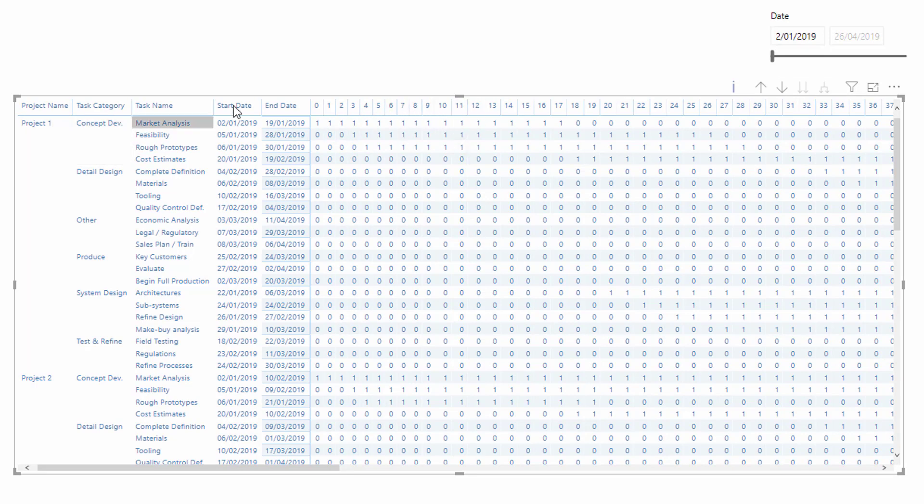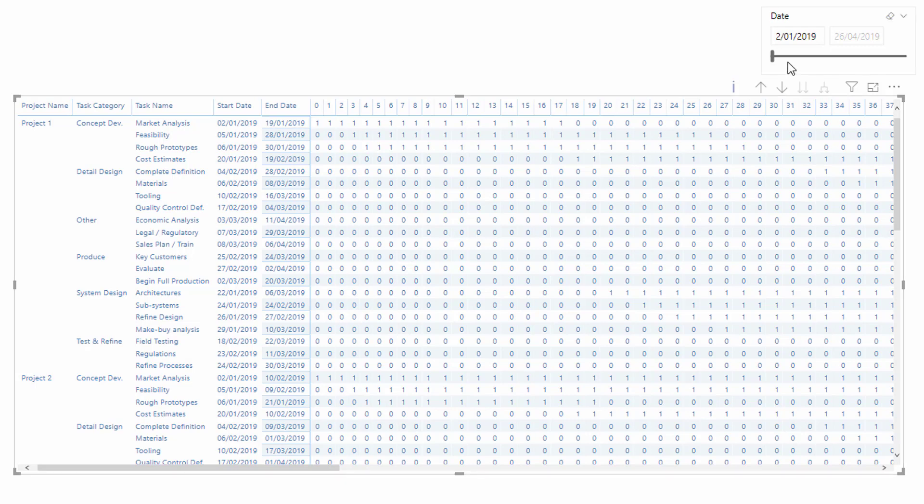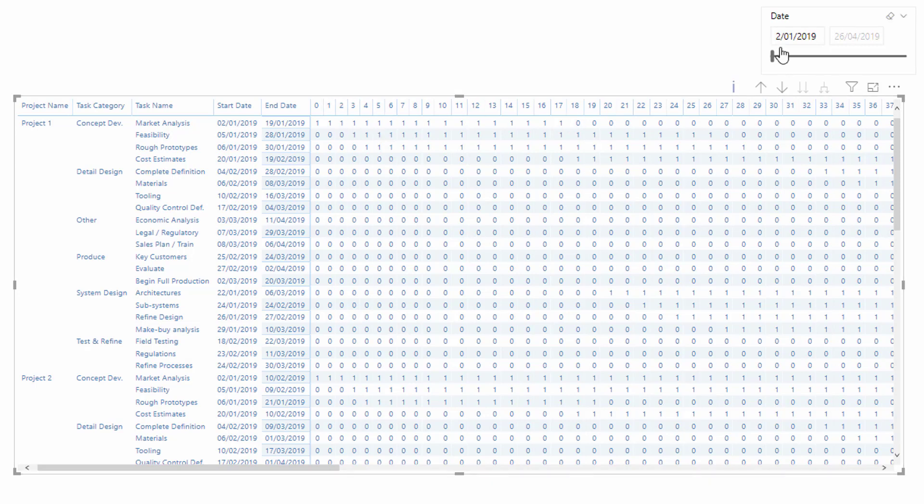You'll see here that this particular project starts on the second and finishes on the 19th, which is why we have zero to 17 days. The 17th day is actually the 19th of January because we're starting on the second. That's what this matrix is doing now, and it's dynamic.